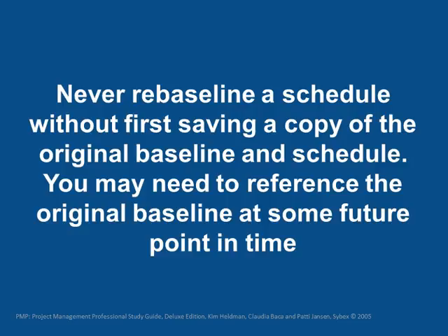Why do you care? Because the original baseline serves as historical information to reference for future projects. Make a backup copy of the original schedule so that you have a record of the original baseline as a reference. Even though some project management software allows you to have several baselines plus the original, it's still good practice to make a backup copy of the original.